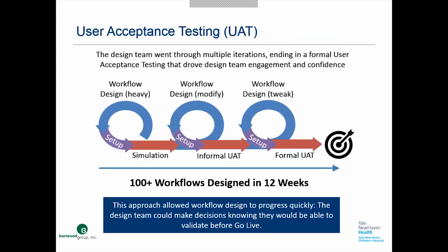These designs went through several iterations. There was the initial workflow design followed by simulations, which then led to a modified design. For instance, when we were around the table having discussions, it was felt that a critical alarm needed to be addressed as quickly as possible to set that secondary alert with a 15-second escalation pathway. When simulated in a real scenario in the unit, it was found that the caregiver couldn't drop their current task and respond to that alarm in that short of a time. They weren't even getting to the threshold of the room before the second responder was alerted and on their way. So this time was increased to 30 seconds.